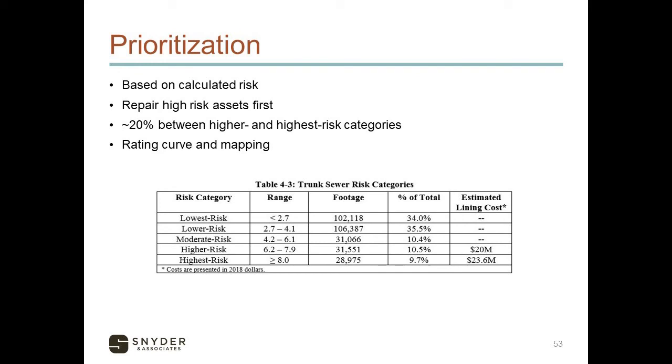As you can see in this graphic, this is a final output of this inspection project. We're getting a smooth curve with our risk rankings on the vertical scale. The highest risk is at the top of the curve. We're looking for inflection points where we can break out categories that group similar assets within that risk range. Really, the main goal of a graphic like this is to create manageable categories to maintain your system.